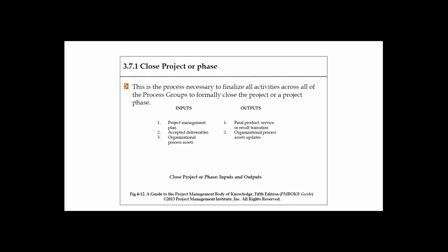You need to give them documentation, conduct transition meetings, and explain how things work. In our regular projects, we give 3 months warranty, and whoever developed the product still owns that product for 3 months, and if there are any issues, they are liable to fix them. But that is still part of operational and not project.